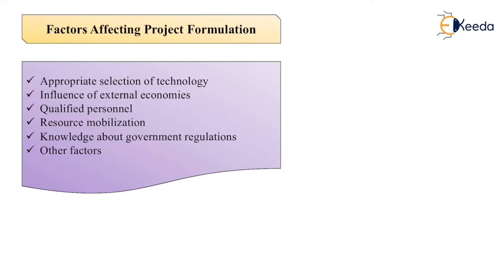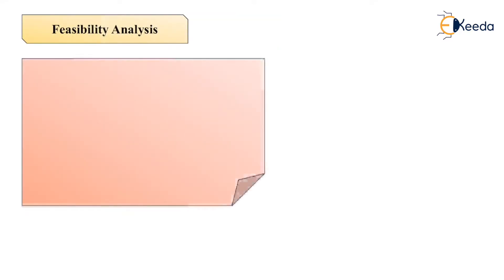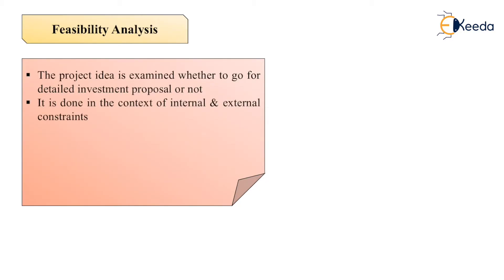Then comes feasibility analysis, so the project idea is examined whether to go for detailed investment of proposal or not. It is done in the context of internal and external constraints. A market analysis is done. Then if the project idea is feasible, we go for the second step, or else abandon the idea. That's why feasibility analysis is very important - whether the idea is feasible for the current market or not.